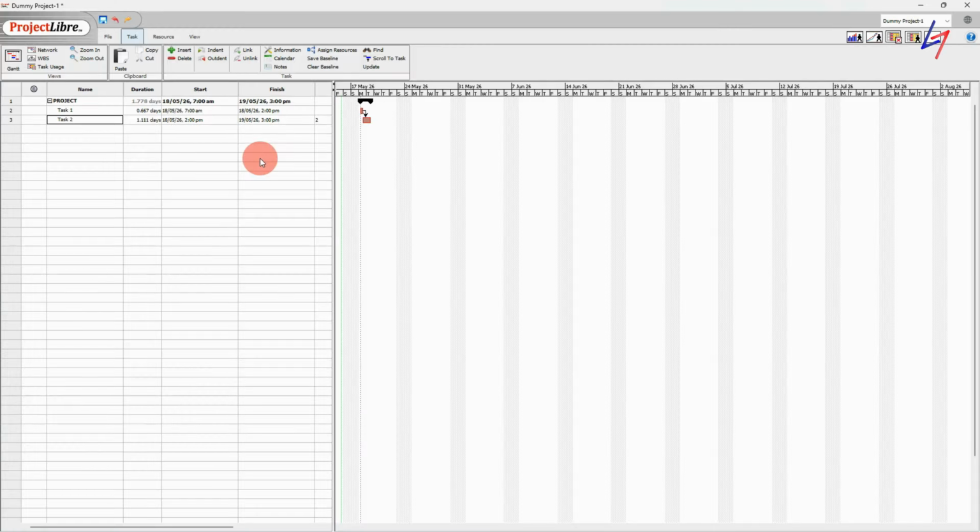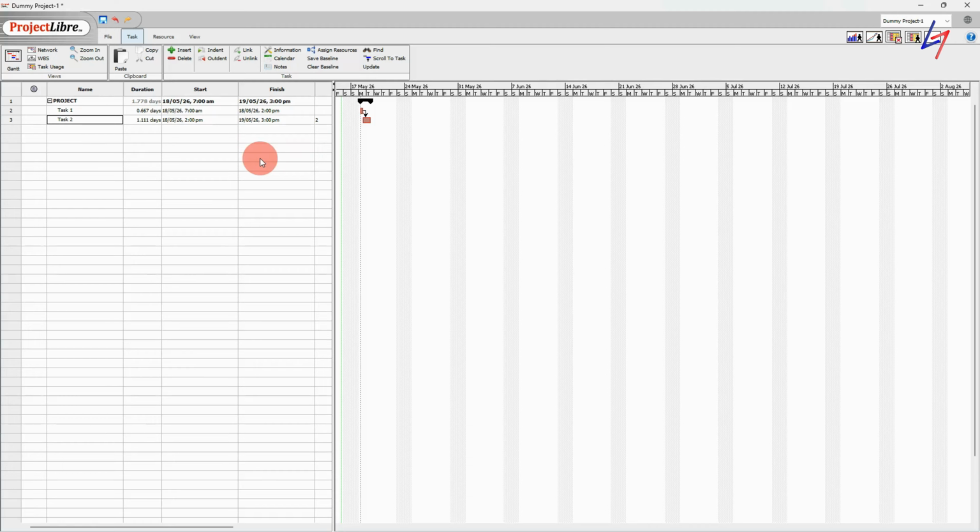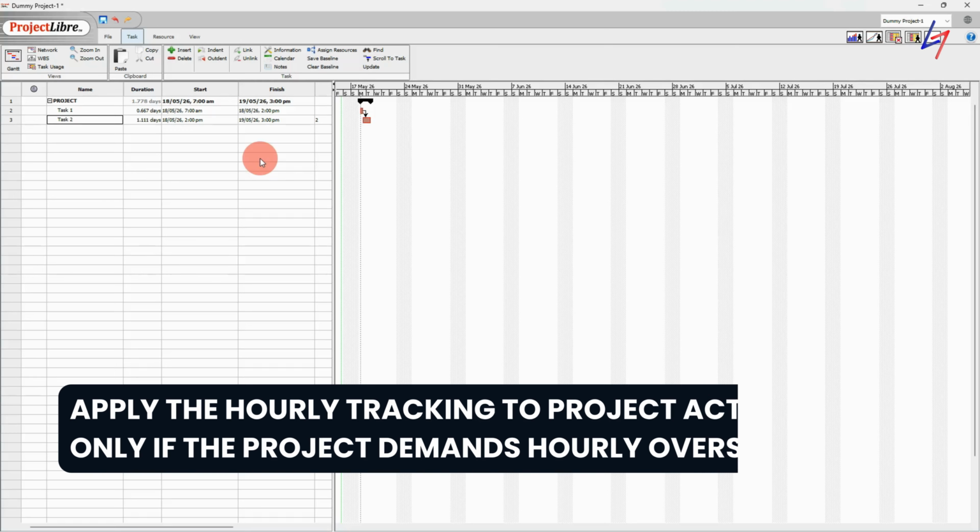As a project manager, I would like to advise something here. We generally don't prefer to have schedules which run on hours. We would generally have them run in terms of days or weeks or months, right? Hours becomes too micromanaging in nature for us to operate on a project level. However, having said that, I understand that when you're doing interior projects, especially interior execution projects, you run by the hours. And in those cases, this type of a calendar might be useful.